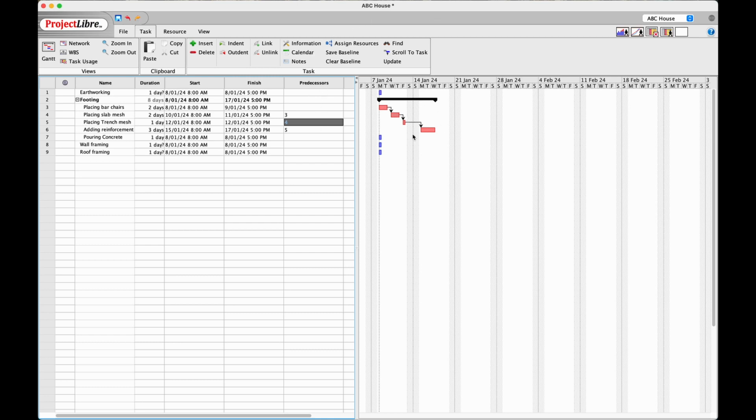The fact that these items are now in red is telling us that they are on what is called the critical path. This is the sequence of tasks that add up to the longest overall duration for the project. In other words, once these are complete, the project will be complete. But any change in the time that any of these tasks takes is going to have an effect on when our project is ready. Once you have created your initial project, you can save it.